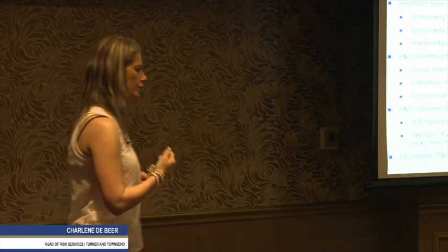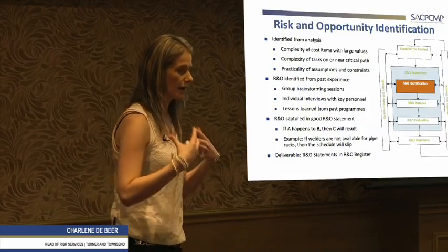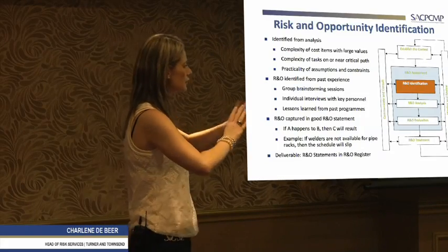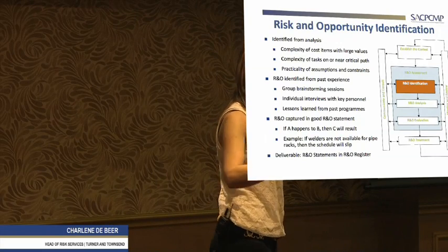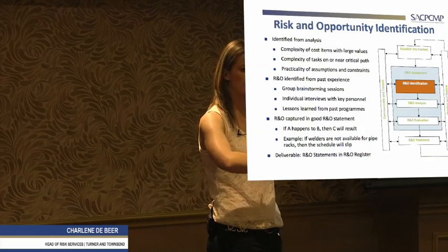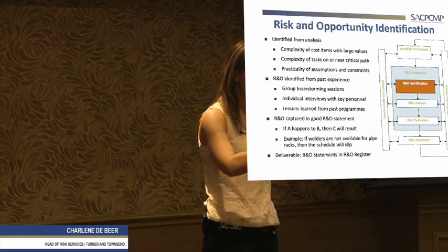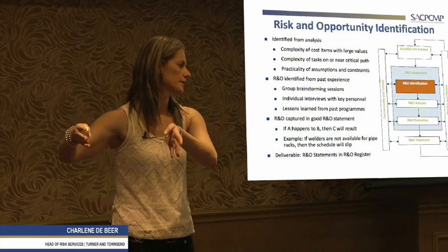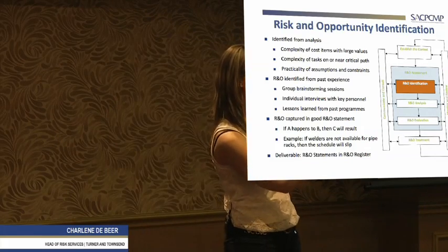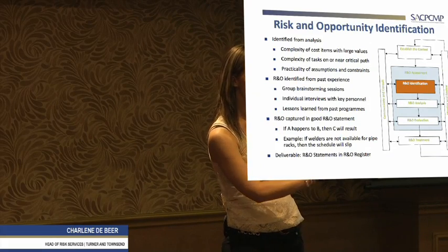So if you would want to do a risk identification from scratch, what I would advise is I usually just draft up this A3 template. I give them the options of listing 3 risks. What's the risk, what's the cause, and what's the possible mitigation? So we'll always add the consequence in the risk, so we don't look at that separate.